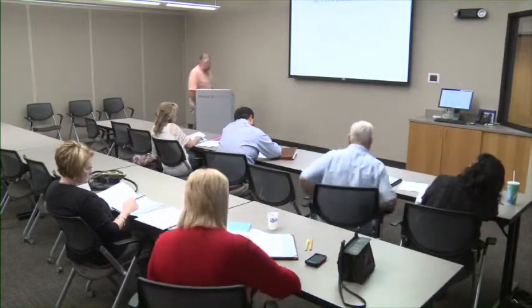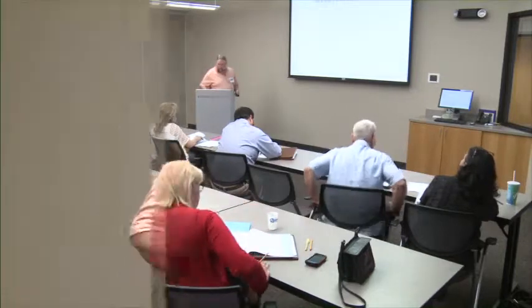Okay, some rules for activity durations. How do we come up with them? Well, first we want to select the time unit for the project. We need to decide what we're working in. Years, months, days, weeks, hours. And we have to be uniform. Everything has to work in that duration.